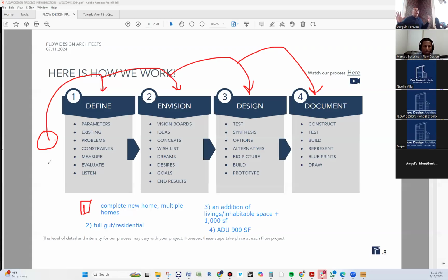We do not want to hold that liability for the R-value. If they get it wrong on site because we told them R60 on the roof when they actually were not supposed to do R50, and that's actually a high. But anyway, we will actually be owning that liability. Now the HERS rater is becoming a consultant, and they take on anything home energy rating system requirements. They're taking on that liability, not us.